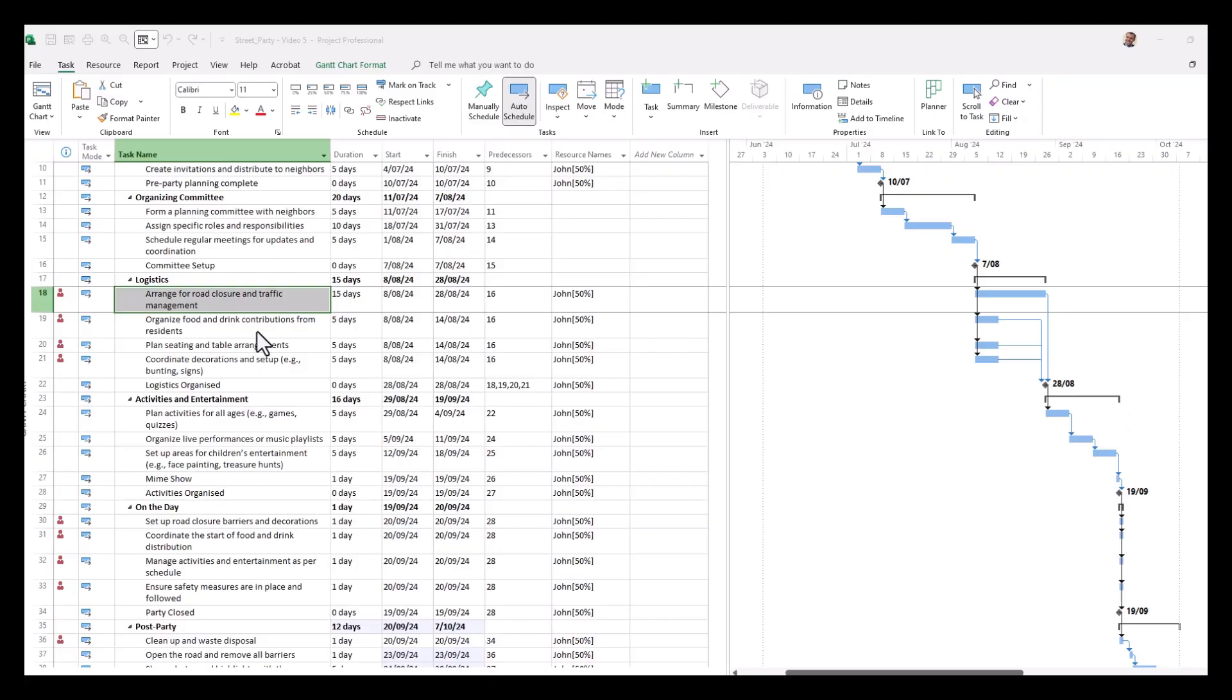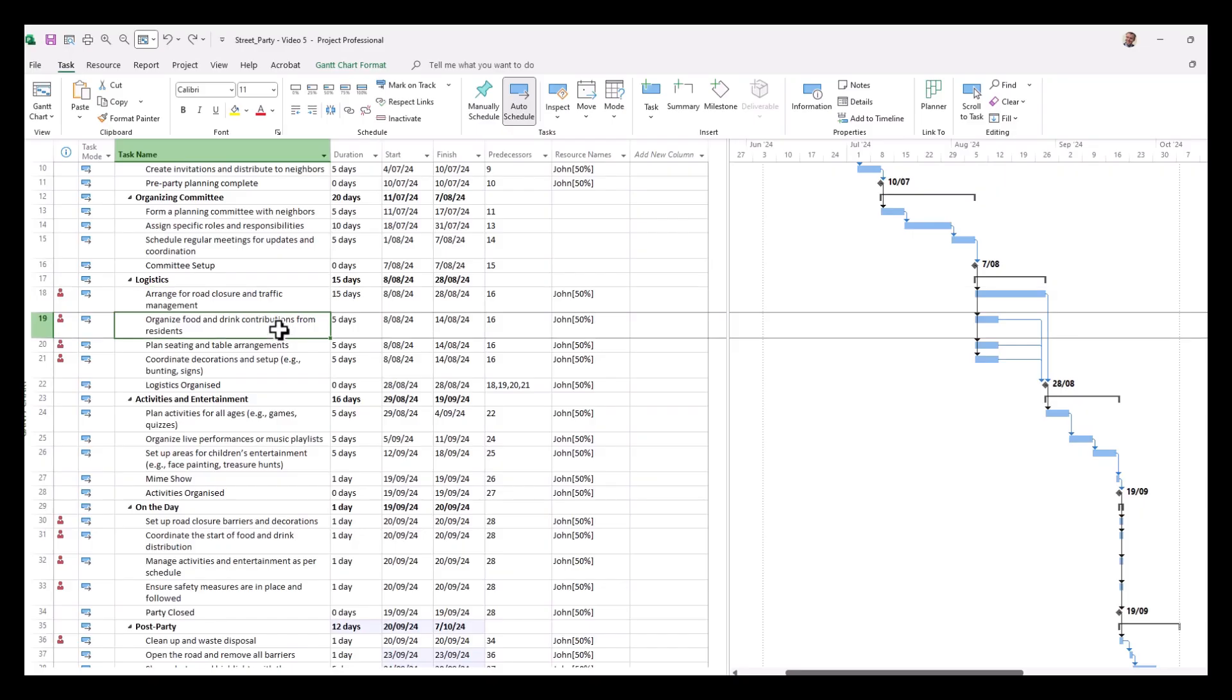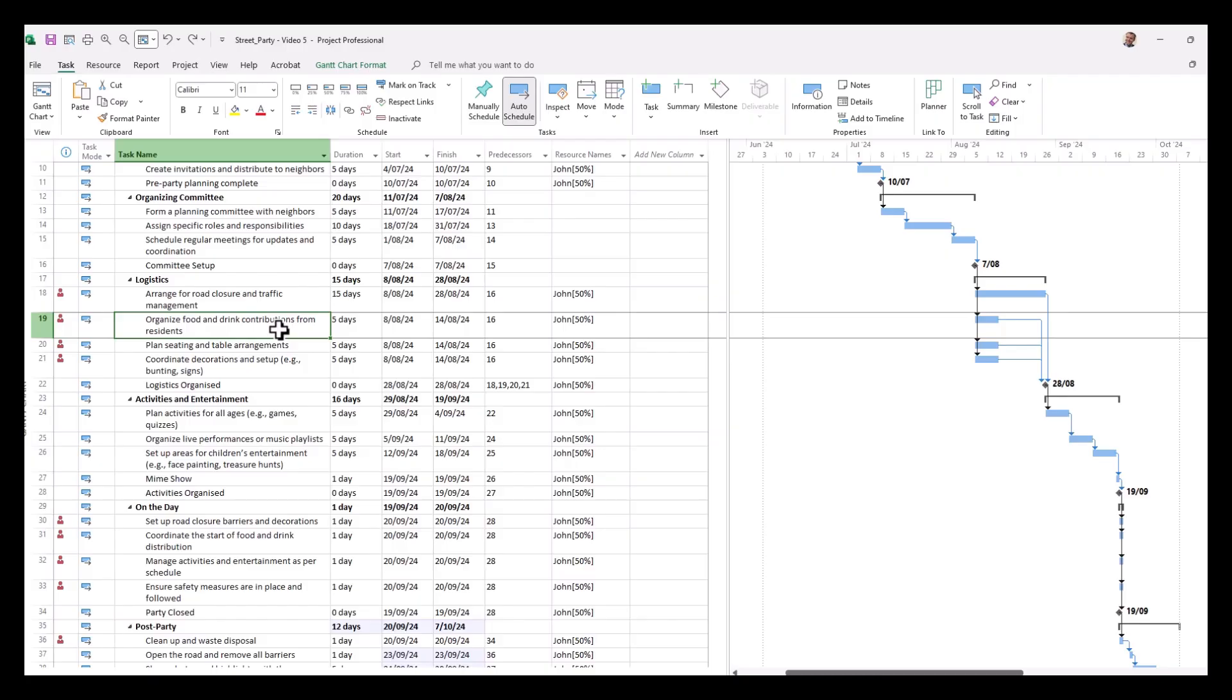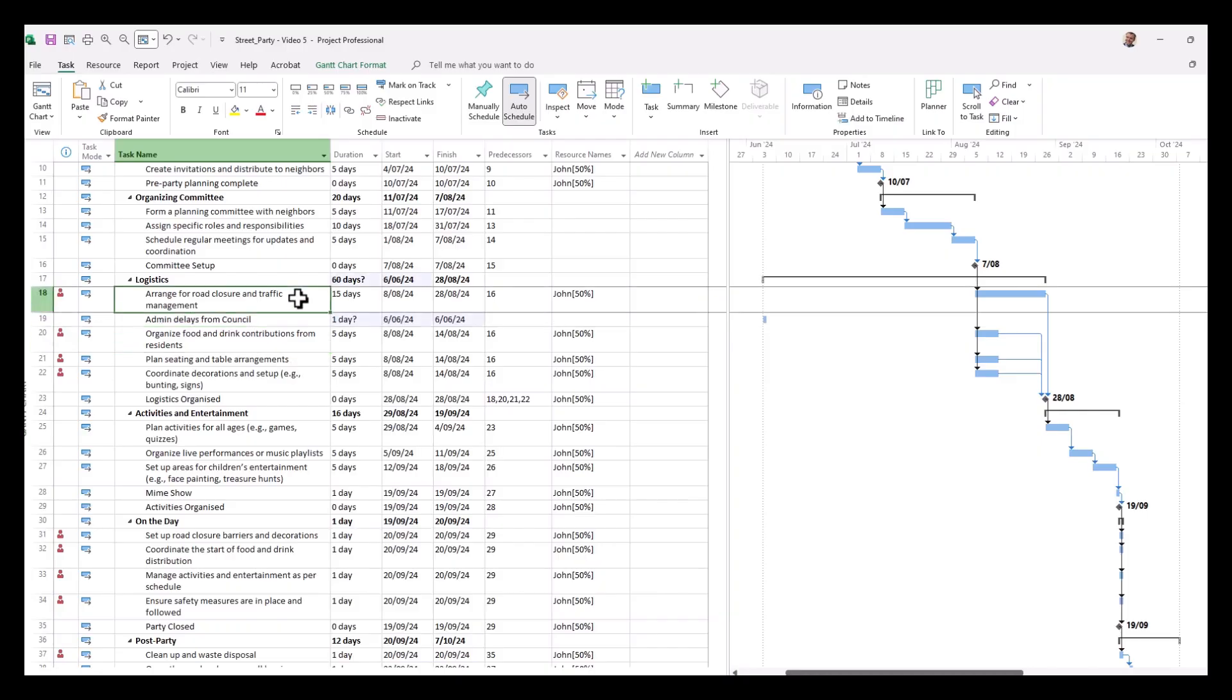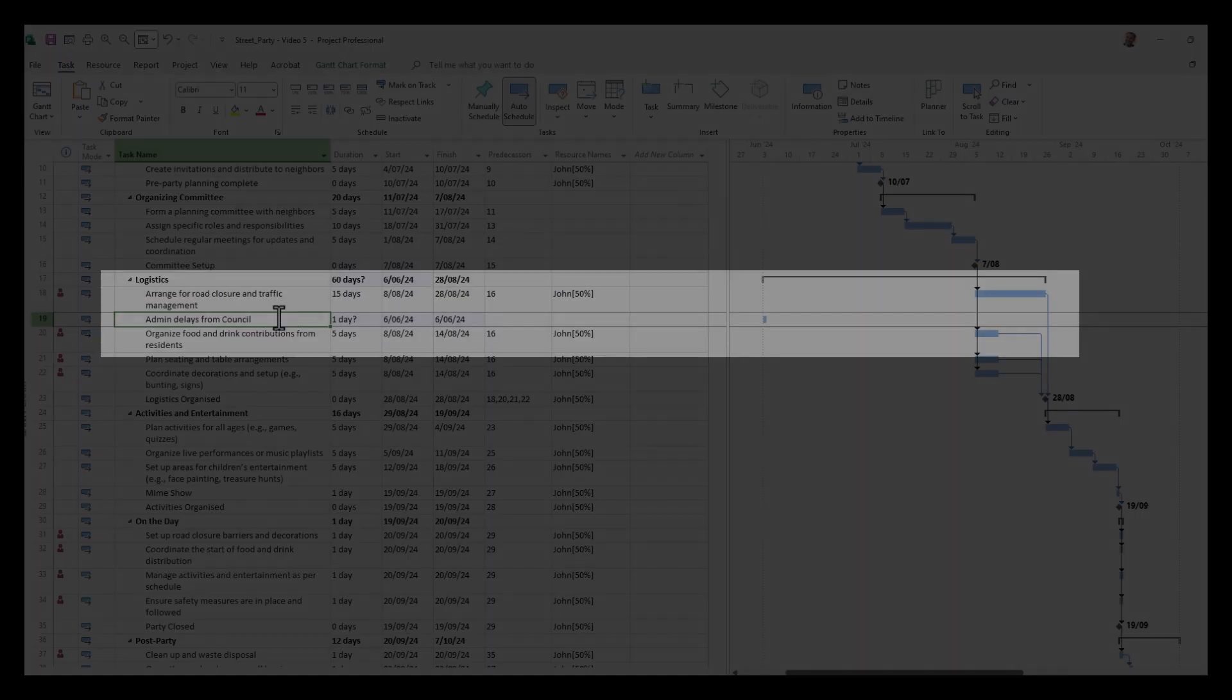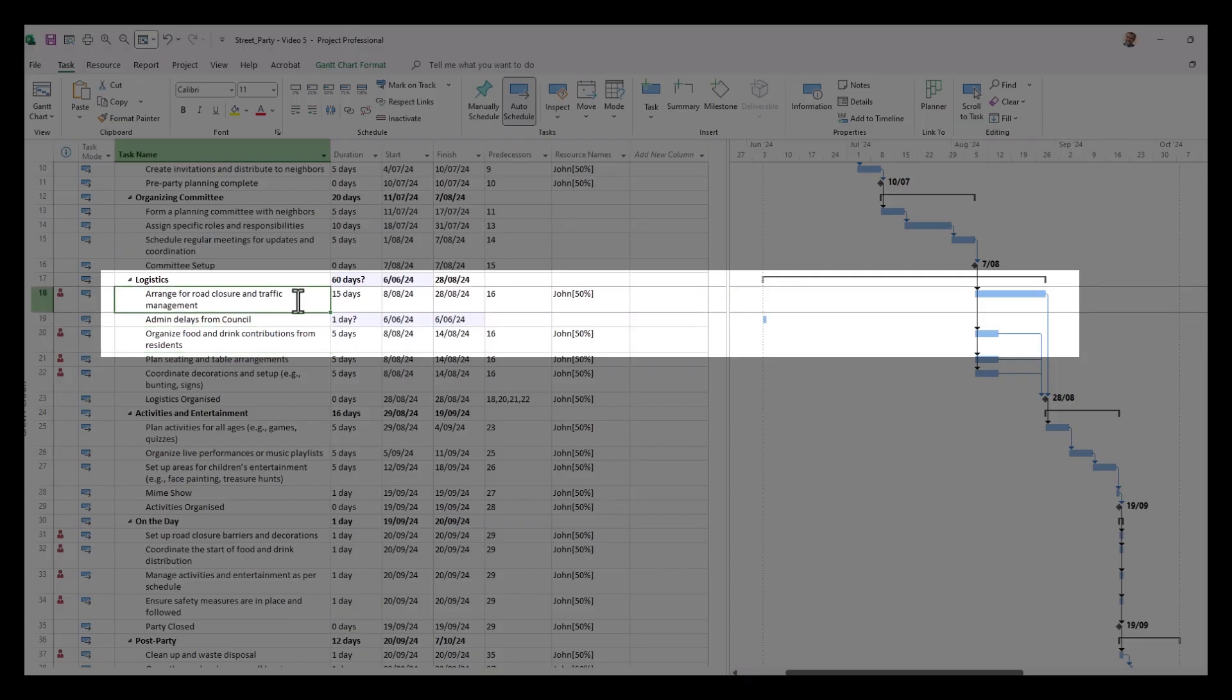For this example we're going to show a delay occurring after task 18, arranging for road closure. We're going to assume that the arrangements for this road closure has been held up due to administrative issues. So we're going to insert a new task here and include that now. We've added that in and we're going to have this delay occurring between these two tasks to make it appear in our Gantt charts.